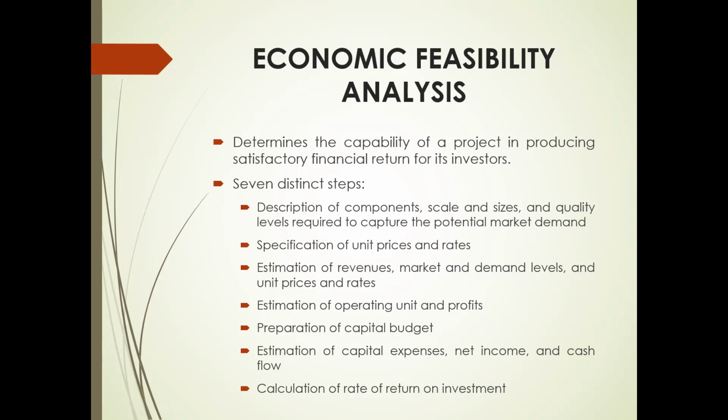A contingency factor, normally between 10 to 20%, is added to some items to cover unforeseen cost overruns or items overlooked. After the capital budget has been completed, the capital-related expenses for the project can be calculated.